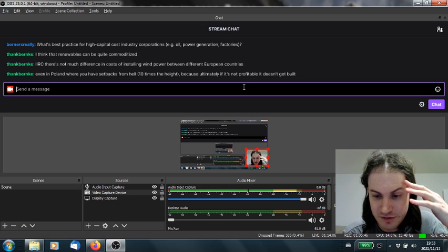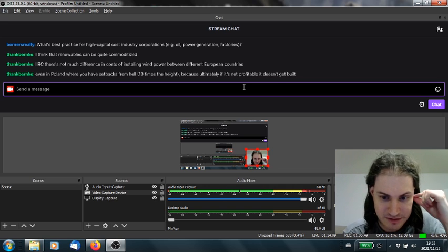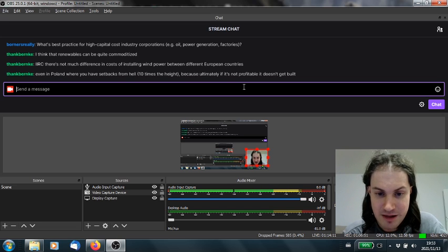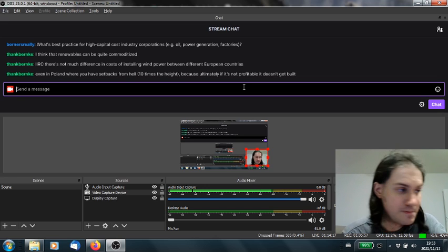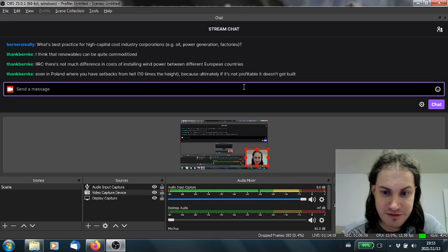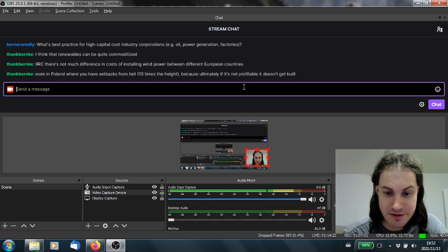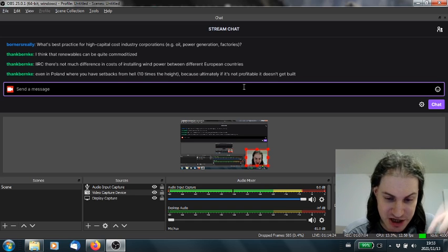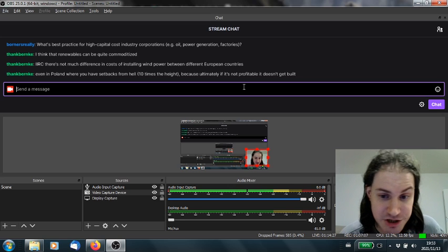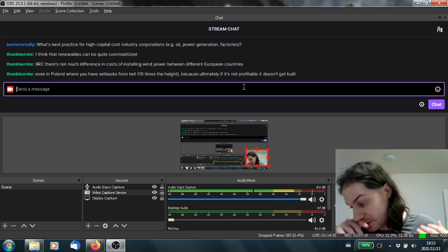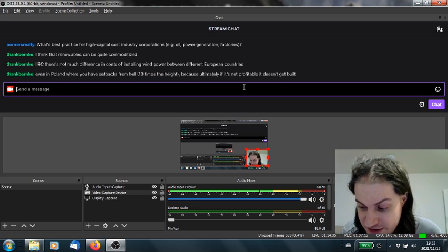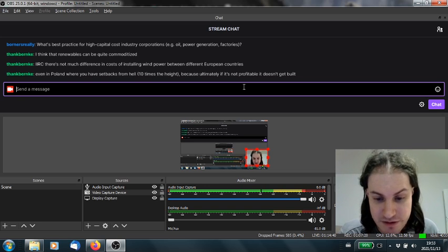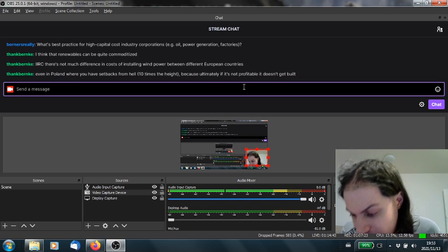This builder knows that they're the only good one because the contractors know which other contractors suck. The bidder knows that the other, let's say, 7 or 8 bidders are not bidding because they have other work. So by process of elimination, the bidder knows that they're the only good bidder, and yeah, they will just jack up the prices. This is a thing when you don't have enough competition. So you need to have as much competition as possible between contractors. Many small contracts are supposed to be better at this than fewer big contracts. But in practice, I don't think that matters as much as just making sure that a lot of bidders can work.